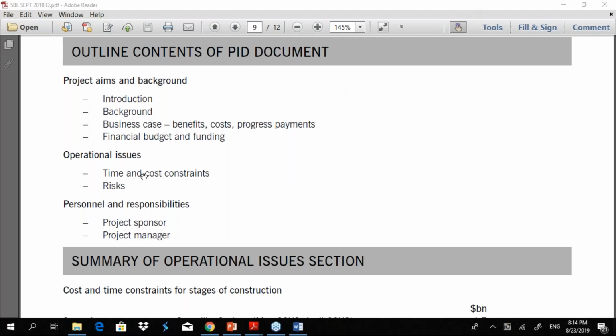And under resources, you can talk about human resource, expertise, because this particular company has not worked in such a project before, or employees with expertise. And if you are to bring in expertise or employees with expert knowledge, do you have it in your country or should you bring it from another country? If so, the cost implications. Don't go too far, keep it concise.